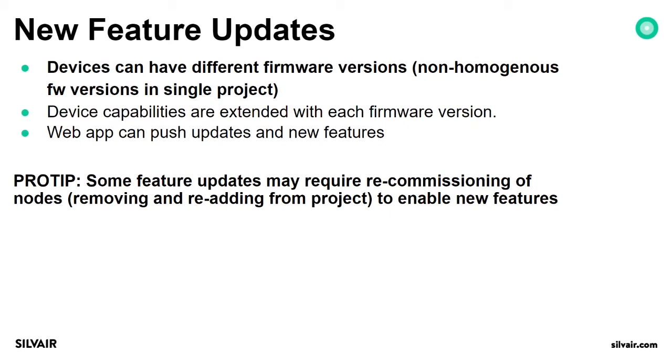And this is important because it's not simple reconfiguration. Some very huge updates may even require recommissioning of the devices. So removing them from the zone and re-adding. Such information will always be available in release notes. So before performing such update or change, always check what will be affected by it.